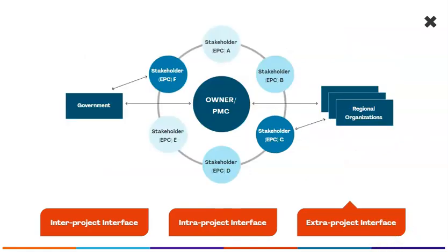These are interfaces between the project stakeholders and other organizations that are not directly involved in a project's execution. A good example of this type of interface is one between an owner and a government entity that issues environmental permits.